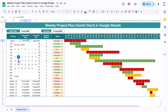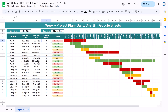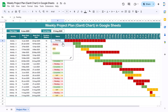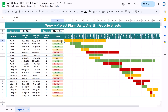We are capturing weeks starting from Monday. If I change the duration — let's say to 15 weeks — it will automatically be reflected in the timeline. We also have color-coded conditions: if status is Pending it shows red, WIP shows yellow, and Completed shows green. This is totally dynamic and ready to use. You just need to input your activity dates, duration, and status, and everything will be created automatically.